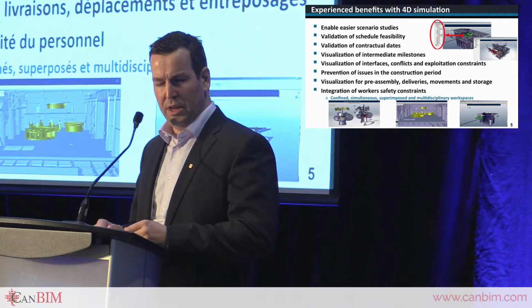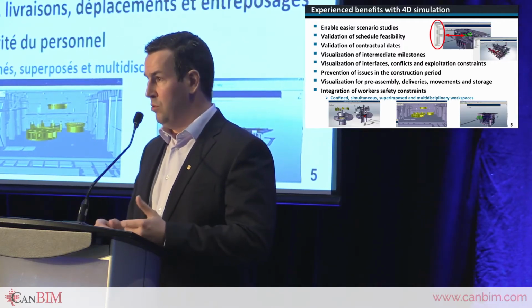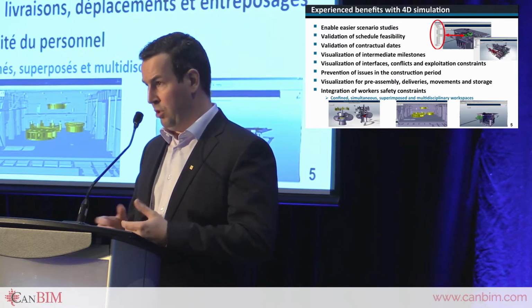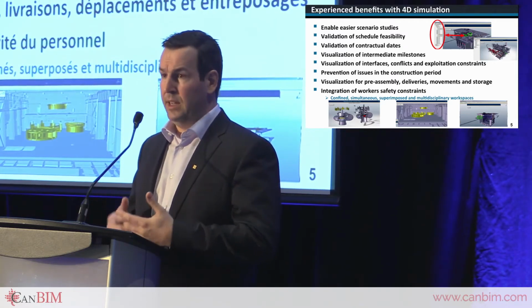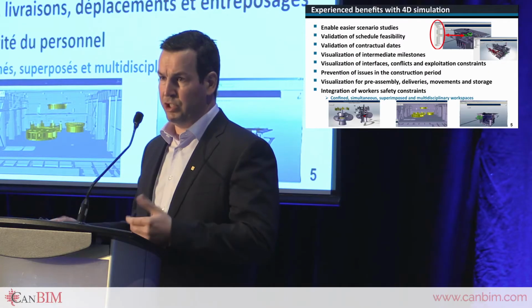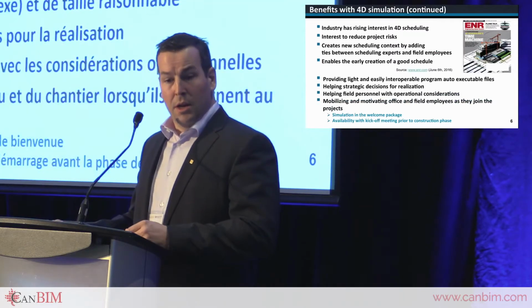We avoided having problems during the construction period. And more recently, we've included movements and displacements, assemblies, deliveries, and storage. More recently, we've also included constraints involving personnel safety, looking at workspace and confined spaces and working on top of each other and having multidisciplinary teams working.